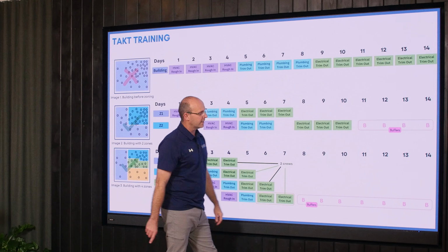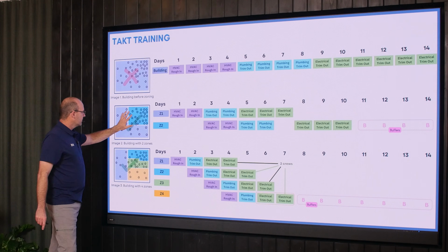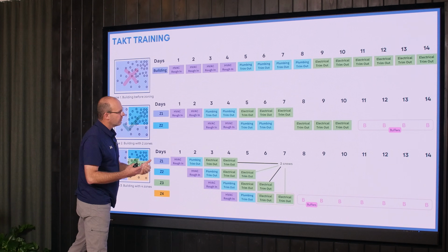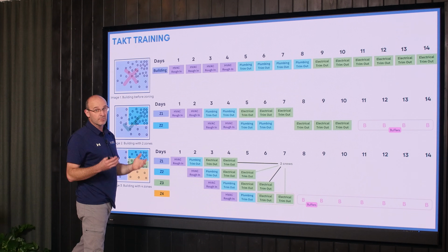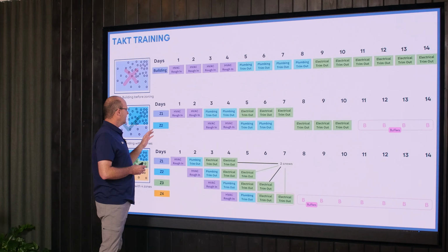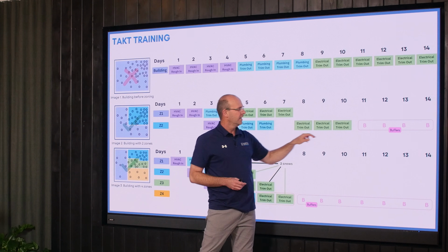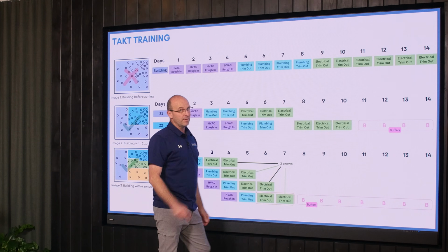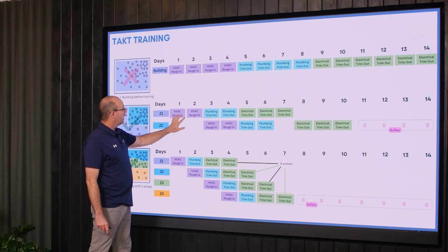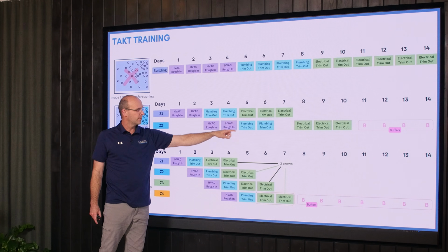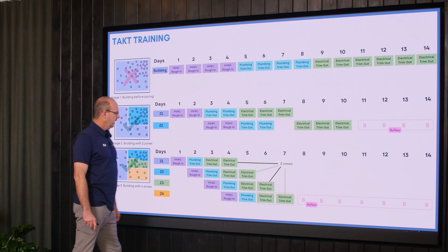One of the things I want to point out here, as we break it up into zones and level the density of work by zone, we are starting to bring this forward and optimize the production plan, but now we're seeing problems. What we're seeing here is that this is a bit too complex and we have a trade bottleneck, but we are gaining time, and the main thing I want to point out, we're not cutting time from the trade but we're still bringing it in sooner.